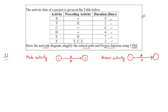In this numerical we follow the arrow activity format, where the activity and duration are provided. Going to the solution part, we need to think about how to prepare the network diagram. We choose the first activity, which is X. Drawing the activity arrow for X gives us two nodes: Node 1 and Node 2. From Node 1 to Node 2 we have Activity X.